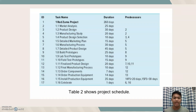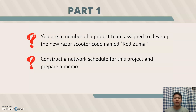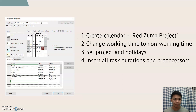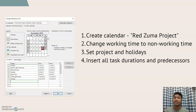The project begins on holidays, and this table shows the project schedule. We need to develop the new reserve scooter code-named Red Zuma and construct a network schedule for this project and prepare a memo. We need to create the calendar renamed to the Red Zuma project, change the working time, set project holidays, and insert all task durations and predecessors.